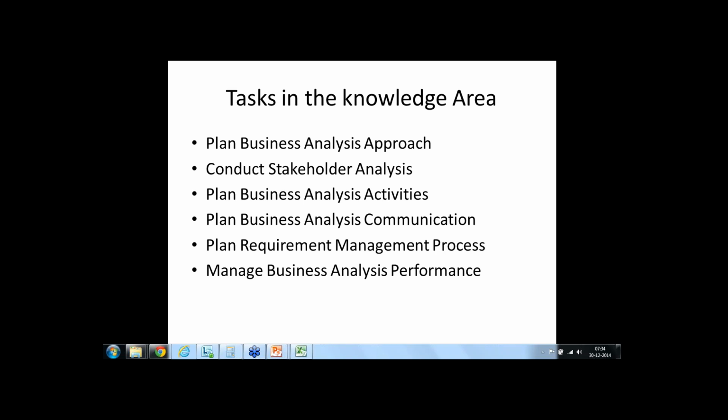And why prioritize the dependencies? Because in any project there are priorities. Say, for example, you work on a project and you have 1,000 requirements. You cannot do all 1,000 requirements at one point of time. So you need to identify which are critical and which need to be taken on priority. It may depend on what opportunity is available in the market, or what business opportunity the organization is looking at, or what the time frame is. All these things you have to consider, and you will arrive at some kind of prioritization.